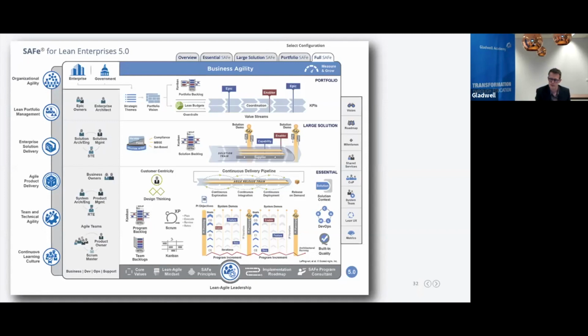So the team would think, we're not going to do it because it's stretch. And the business owner would think, okay, they might do it because it's stretch. And that's really not leading to more alignment, right? It's fake information, fake news. So saying it's uncommitted is really underlining the fact that, okay, we have looked at it, we have estimated the size, we have planned. However, there are things there that are out of our hands and we cannot influence that. So that's why we make it stretch.